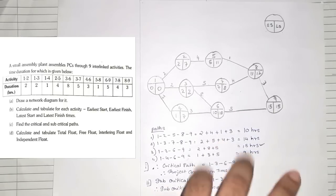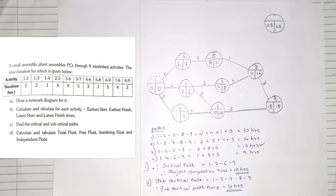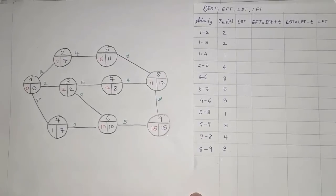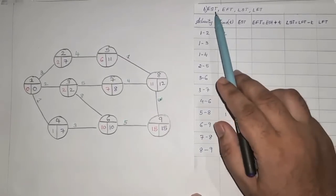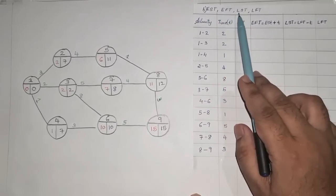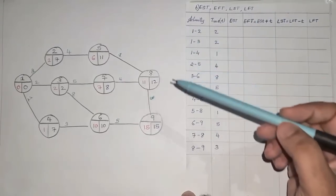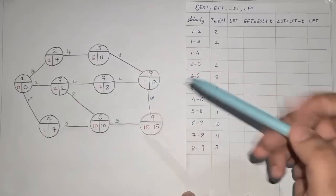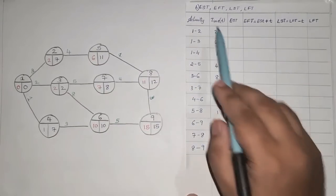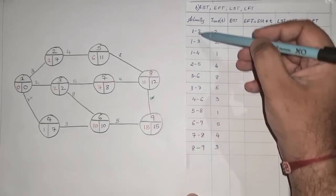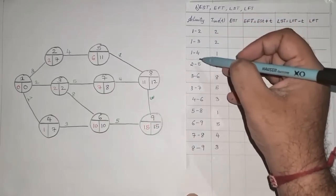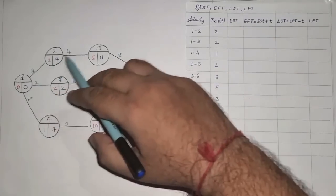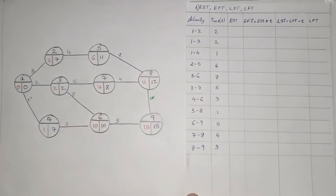Now we use these network values to fill a table for each activity. For earliest start time (EST), we look at the first value of the starting node of each activity. For activities starting at node 1: EST=0. For activity 2→5: EST=2. For activities from node 3: EST=2. For activity 4→6: EST=1. For activity 5→8: EST=6. For activity 3→6: EST=10 (from node 6 perspective, correction: EST=2 for activity 3→6 starting at node 3). For activity 7→8: EST=7. For activity 8→9: EST=11.